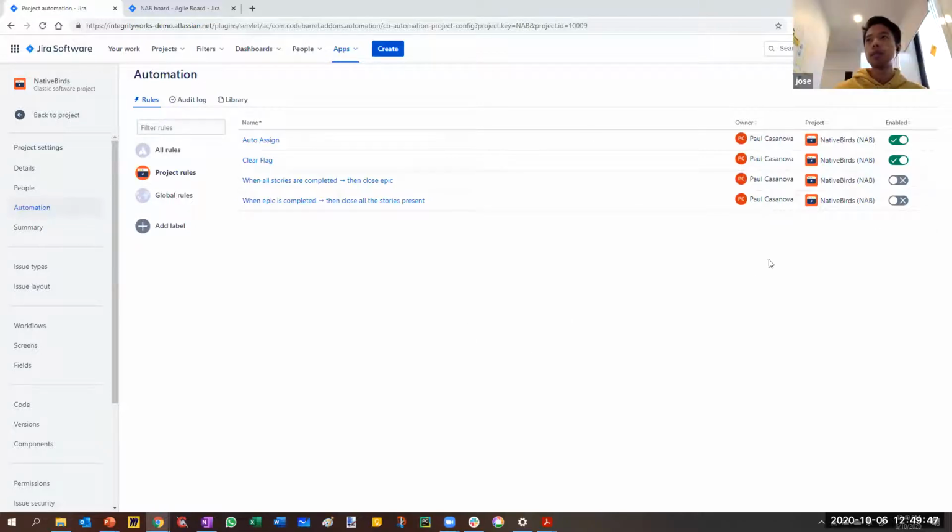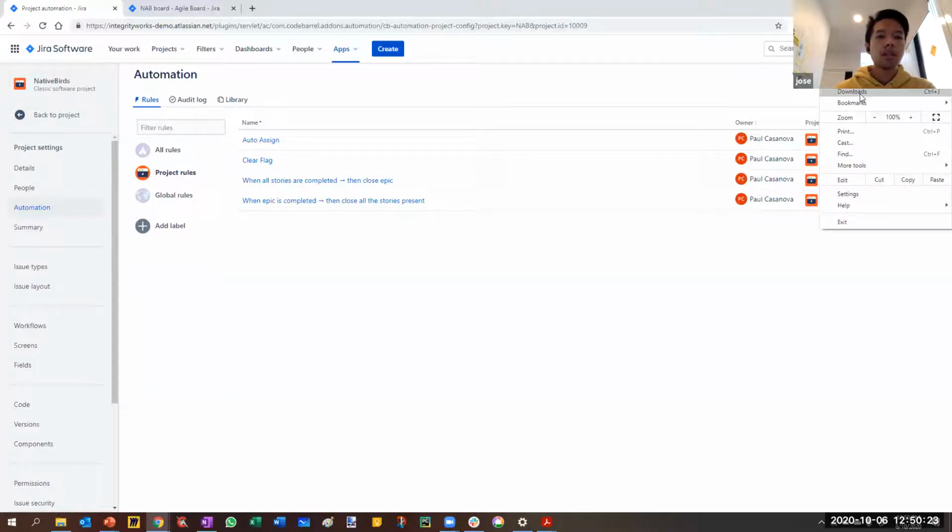Yeah, I've tried to create housekeeping automations, which could pick up on all tasks or issues in the backlog in the past, let's say 2 months ago, that has not been assigned to anyone. And it will give some sort of reminder to the creator and to review it again whether it's still needed. Otherwise, maybe they can action it appropriately. Awesome. So have you created that in the... Yeah, it's under APR.